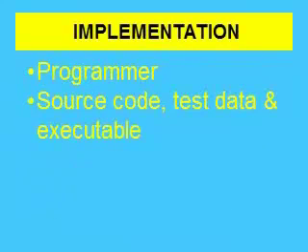And then move on to implementation, and this is where usually the system analyst stops having an input, and they give their functional spec and their system spec and the requirement spec to the programmer, and the programmer is responsible for creating source code, some of the test data, or the outline test data, and the final executable, which will be passed to the client for testing and the independent testing group. A fairly simple stage. Usually not so much time is spent on the implementation as the analysis and design, maybe about a third of the time that would be spent on the earlier 2 stages.